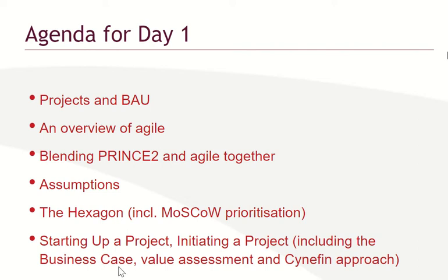A business case is a document that provides justification for why that project should be implemented. The project will need to provide basic information about what the project cost is, what the benefit is, and what the organization stands to lose if the project is not done. That is going to be part of the business case. It is a document used to justify and to get approval to begin or continue with the project itself.